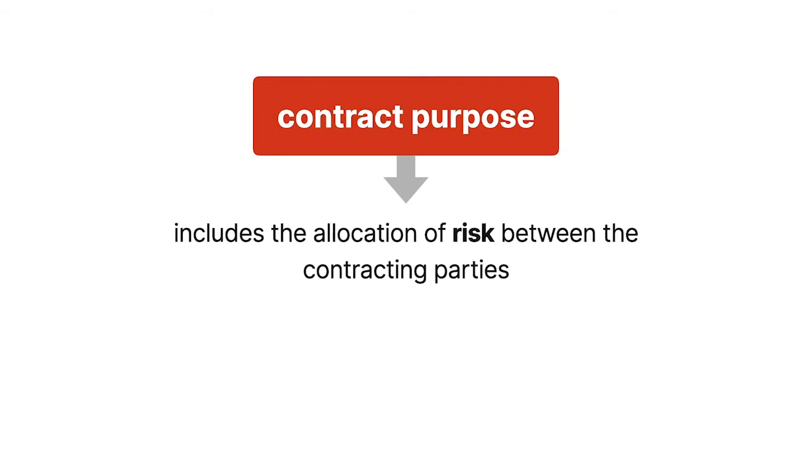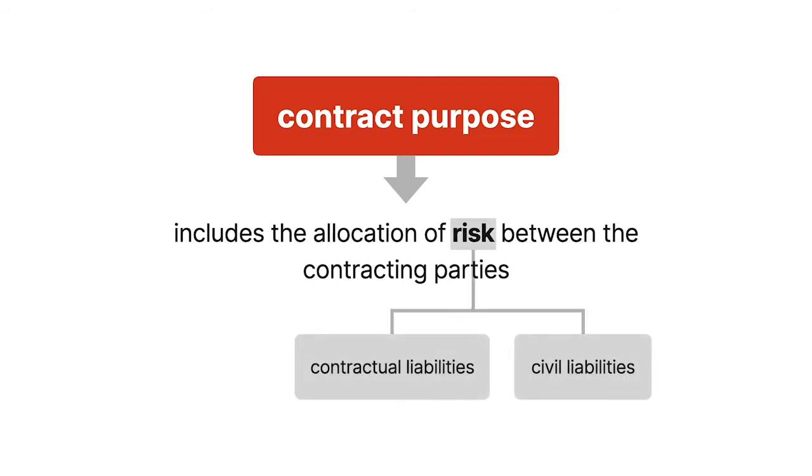One of the things that's true with every contract, and specifically true with construction contracts, is that the contract is all about risk shifting. It's deciding who is going to bear what risk regarding the construction project. For example, who is going to bear the risk of an injury to a third party on the construction site? Is it going to be the owner? Is it going to be the general contractor? Is it going to be a subcontractor? Is it going to be the vendor of machinery or materials that are going into the project? These kind of issues can be worked out before the project even starts.